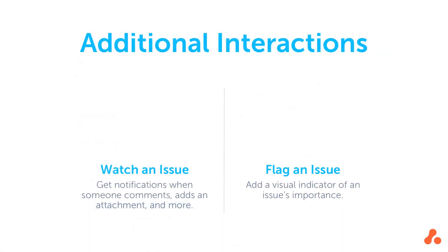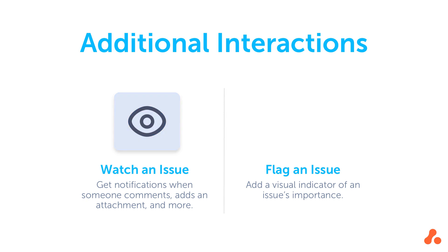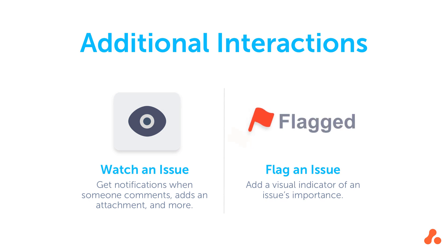As well as editing and adding information on an issue, you can interact with it in a couple of other ways. You can watch an issue if you want updates in the form of notifications — you'll receive notifications whenever someone adds a file, a comment, or interacts with the issue in several other ways. You can also flag an issue to add a visual indicator about its importance or status.